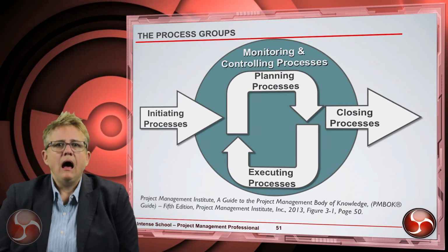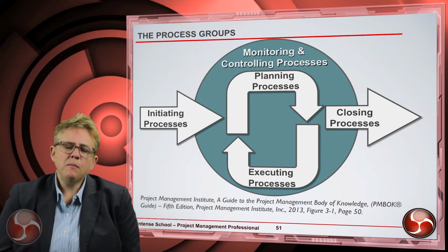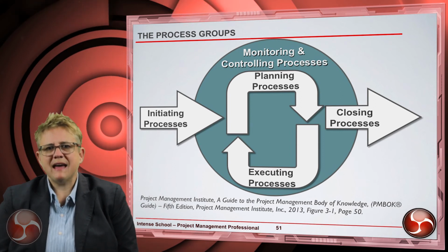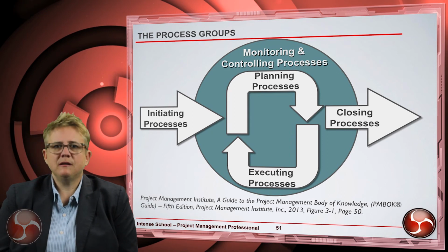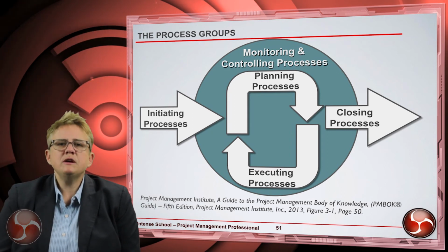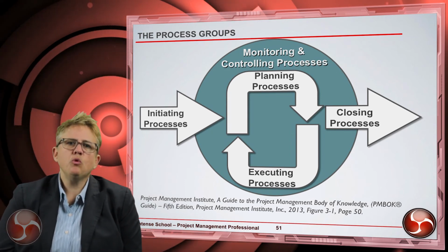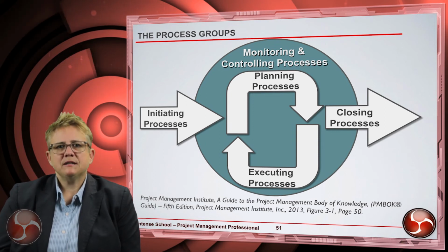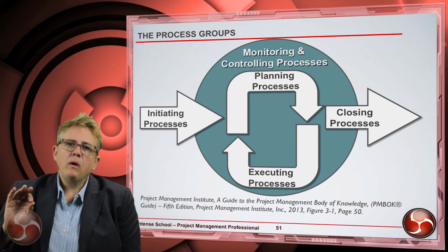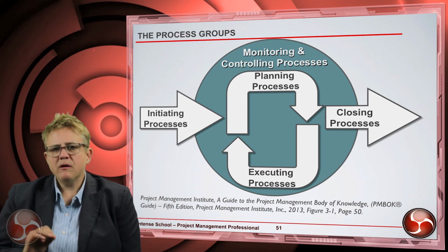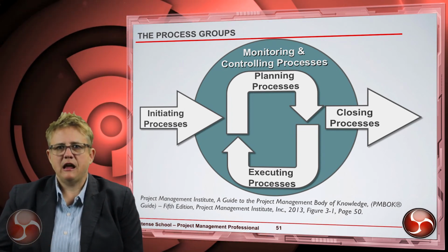All right, now with the process groups, you want to be careful not to refer to them as phases of the project management, the phases of the project. And the reason for that is that when we use the word phase, it implies that there is a start and a finish to the phase. But when we look at the process groups, they're very, very much iterative in nature.